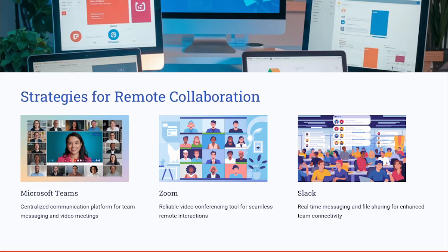For example, when you are handling an agile project, you have the daily stand-up meeting where every team member has to show their achievements. There are three questions that each team member has to answer: what you did yesterday, what you are planning to do today, and whether you have any challenges or misconceptions that you need support with to be resolved in order to continue doing the work. So it's very important to have these regular virtual check-ins to maintain alignment with the project plan, objectives, and timelines.